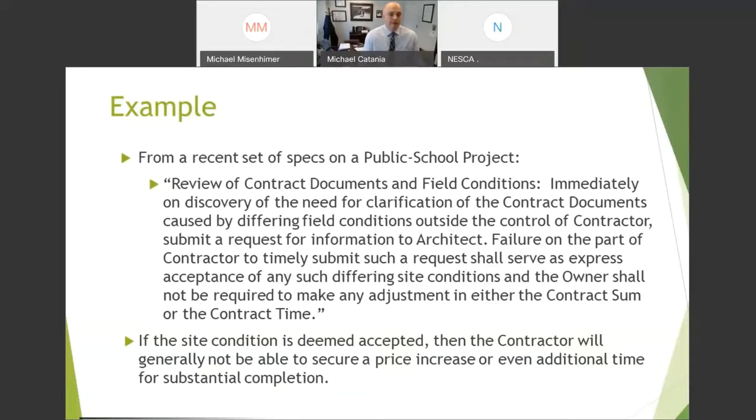So what's the answer? If you can't make revisions to it, you're stuck with it, highlight it, put it on the front. Let your project manager know on this job, if there's ever an issue, here's a template letter. This has got to go out ASAP, and cite the specification in the letter. Never waive a claim because of a failure of written notice.